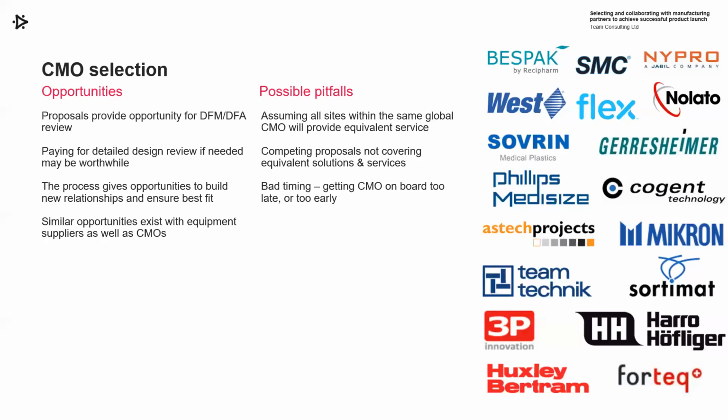As I mentioned before, development organisations can move very quickly in the early stages of prototyping and concept development. That's not to say CMOs can't move quickly, but sometimes they're better suited to later stage development and production, setting up production systems with a bit less flexibility, a bit less agility. In cases they can move quickly, sometimes it's just the fact that two companies can maybe move a little bit more quickly than three in terms of decision-making processes.